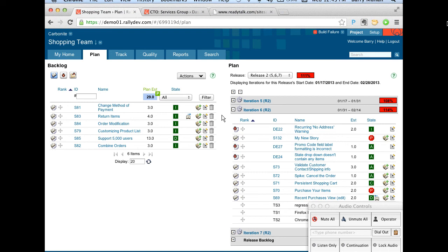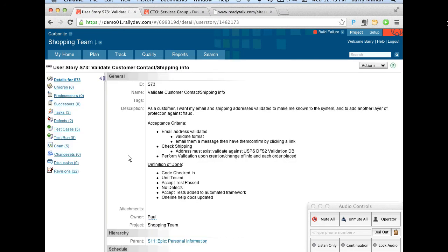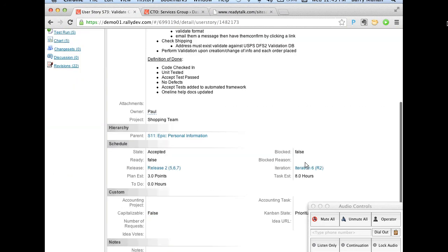But the end result of this view is that each work product has an association to a release and an iteration, but they are not hardwired together. I could be working on something in this iteration that is pre-work or early work for the next release, so you can set it up that way. I think maybe the problem is really around the planning views.